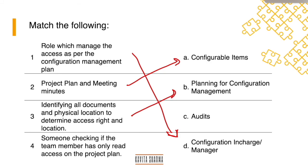Someone checking if the team member has only read access on the project plan. So third set of eyes checking or happens in audit wherein whatever the access rights which are mentioned, whether they have been implemented or not. Great, you did good.